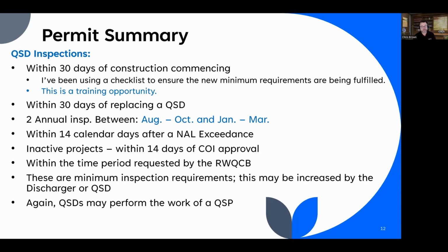Your erosion control stockpile? Leak trace for toilets. Where's the WDID posting notice? Has the delegate received their foundational and site-specific training? Was the training log provided? Was it uploaded to SMARTS prior to them performing any of the duties? These are all permit requirements. So like I said, there's a long list of things that I'm looking at. Those are just some examples.